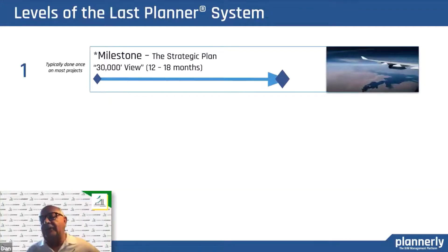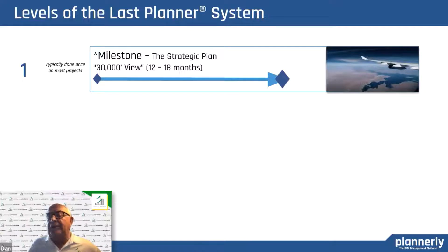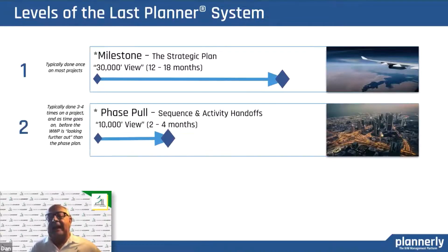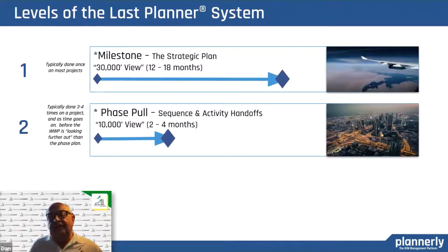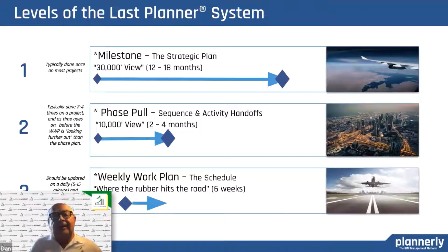Phase planning operates at three levels. First, the milestone level — the strategic plan, the 30,000-foot plan. You might think that means 50% DD or 95% DD, but there are probably some better milestones along the way, having to do with decisions or approvals by a government agency. Then there's the phase pull — for a much smaller, more manageable chunk of work. In construction it's two to four months; in design it may be two to four weeks. Then once you have a phase pull with all the different steps involved, you drop down to a weekly work plan for accountability and a weekly check-in.